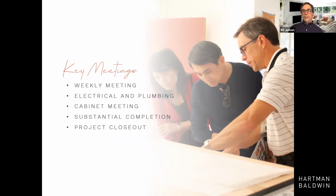We'll also have what we call a substantial completion meeting, where I always love it, where the kitchen starts to come back together and people start asking every week, when can we start cooking? When can we start using it? Well, we'll reach a point where you can start using your kitchen, but there's still little things we need to do. We've got a cabinet door out of square. We've got a little scratch on the floor. There's a little fleck in the paint. And we'll make a list of all of those things and put dates to it and make sure we check off that list so that we don't get to closing out the project until you're completely happy.